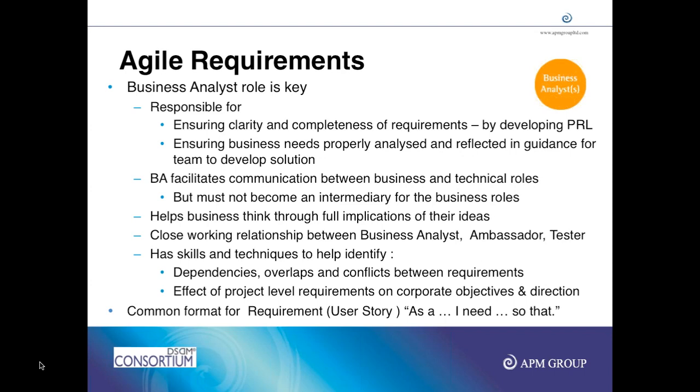The breadth is decided during foundations, and the depth is worked on during time boxes. As long as there are changes in depth, we don't consider it a change request. The team needs to make a decision about it. But when we have any requirement that was not agreed at the time of foundations, it is considered a change request, and formal approvals are sought to consider that requirement.